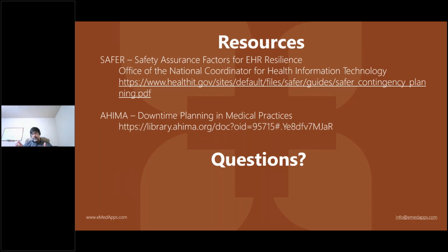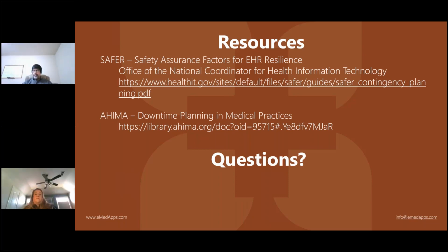And last but not least are the results from the downtime itself. You may find that when a downtime occurs, certain things didn't happen the way you expected them to when it's used on a large scale, and that's going to generate some process improvements in your downtime as well. Make sure those are captured and the process is refined to deal with the information that came from the downtime.